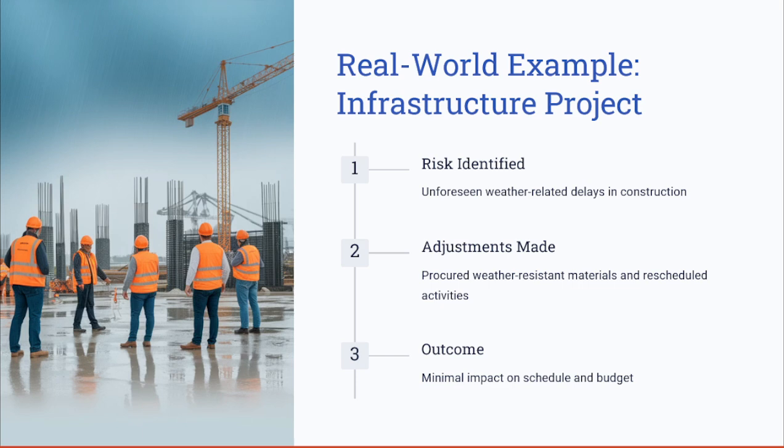So the project team has looked at its mitigation strategies and found that they have to adjust the mitigation strategy by, let's say, procuring weather resistant materials and rescheduling the activities during favorable conditions. So this is how you have adjusted your mitigation strategy to face bad weather conditions.